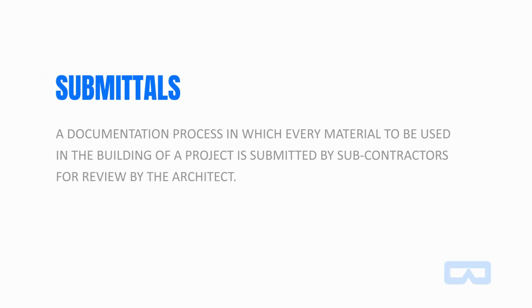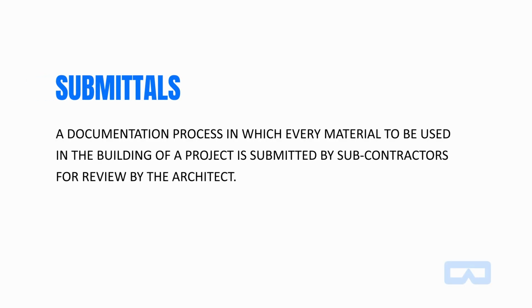And submittals are essentially a documentation of every material that is going to be put into this building. It's kind of the architect says, here's what I'm designing, and here's a list of the materials that I want to use. Now the subcontractor or contractor who's going to be installing those materials has to document, yes, I'm going to put these materials in.